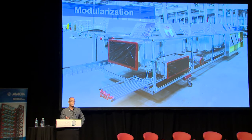The project clip I'm about to show you is a project that we built in Denver at University of Colorado Hospital, and it was the second project in the US where modularization on a hospital was done. The first one was done in Florida by Skanska, and a lesson learned on this: if you see something that's new and different going on in the industry, our experience has been if you reach out to the project team to learn something about it, they will share with you what they've done. People are proud of developing new approaches to business, and you just have to take the step to go ask. In this particular case, we called Skanska out of the blue and said, we want to come down and learn what you're doing. We took a trip down to Florida, learned what they're doing, and we came back and applied that on the next job.